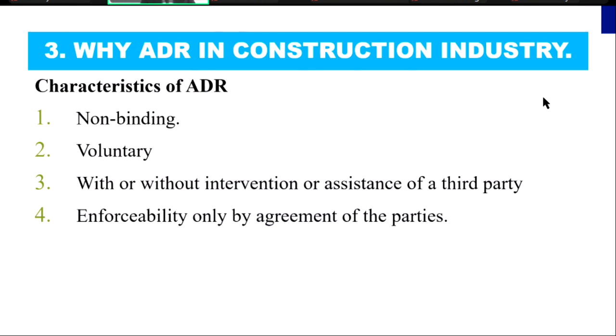In other jurisdictions, like the UK, they have a legislation they call the scheme, which mandates that in any construction contract, there must be an adjudication clause, and without it, appointment and the execution, then the state adjudication applies. But for our country in Africa, I think generally we don't have anything like that. All our ADR are voluntary.